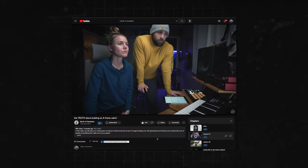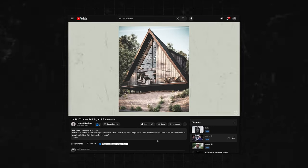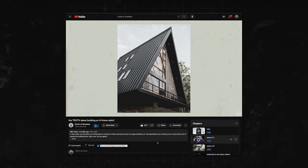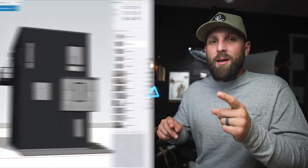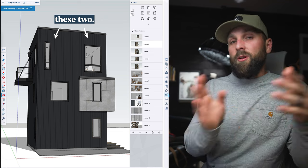The next big line item is windows — we're budgeting $30,000. We haven't decided yet between Pella and Anderson, so we're getting both quoted. For the most part we have standard window sizes, which is a benefit of our rectangular shape. If you saw our earlier video about the A-frame we considered, that build had a lot of custom glass for the window wall, which adds up quickly. We do have two custom sizes on the top level — one is an almost floor-to-ceiling eight-foot window.